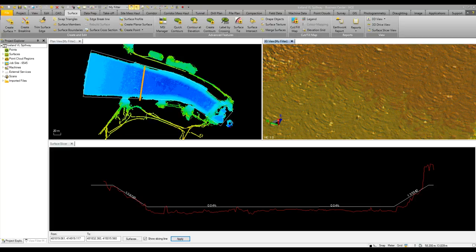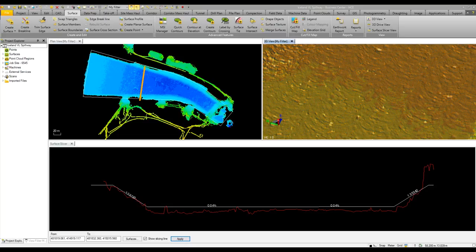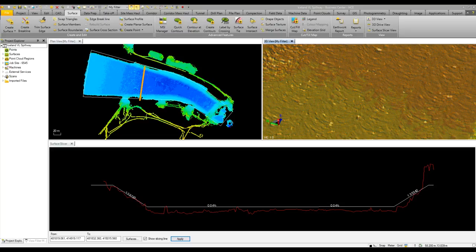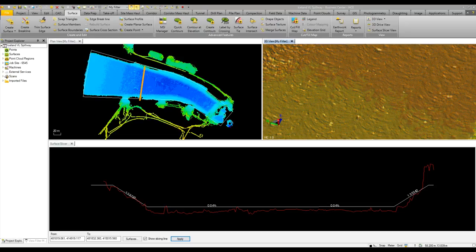From this we could determine as a job is progressing what's the time needed to complete a project. Are we then working to schedule? Report that volumetric information into tie loss and see if that is on schedule, and plot plan and cross-section views showing compliance to design specifications. Thank you, that concludes the Vision Link integration.